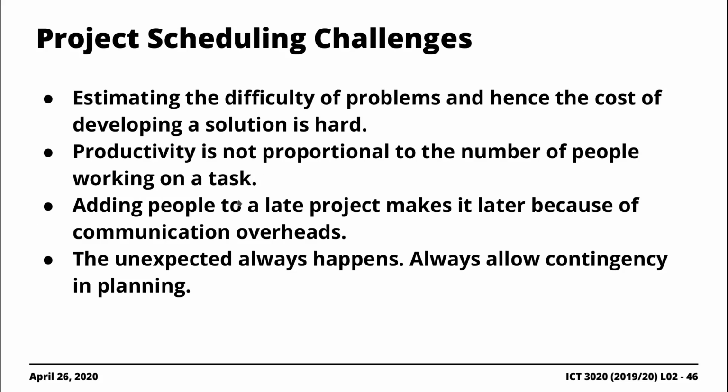Another scheduling challenge here is the temptation to add people to the project towards the end of the project or midway through the project, right? You might end up delaying the project because new people normally introduce things such as communication overheads, right? They would have to learn the way that people that are already working on the project interact with each other, for instance. So imagine this, right?